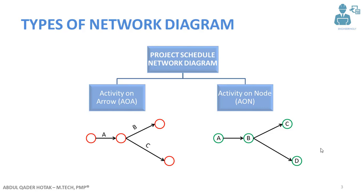The first way is activity on arrow, or AOA, and the second one is activity on node, or AON. In activity on arrow, which is not used so much these days, the activities are written down on the arrows and the length of the arrow shows the duration of each activity. The circles here are called the nodes — this is where an activity starts and this is where an activity ends.